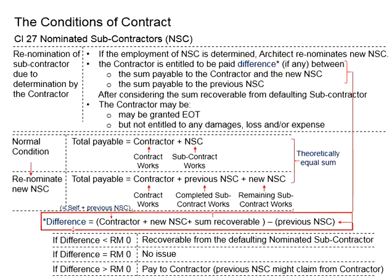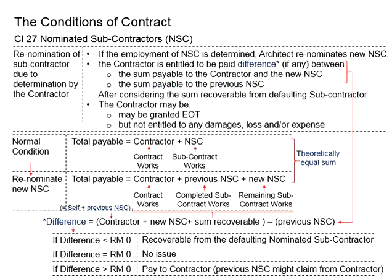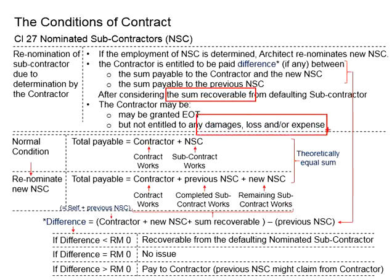To better imagine this, you can look at these equations. We are talking about the total sum payable to the contractor and the new nominated subcontractor, against the total sum payable to the previous nominated subcontractor. And then there will be a sum recoverable from the defaulting subcontractor, which shall be used for rectification in case of any damage and losses incurred due to the defaulted nominated subcontractor.